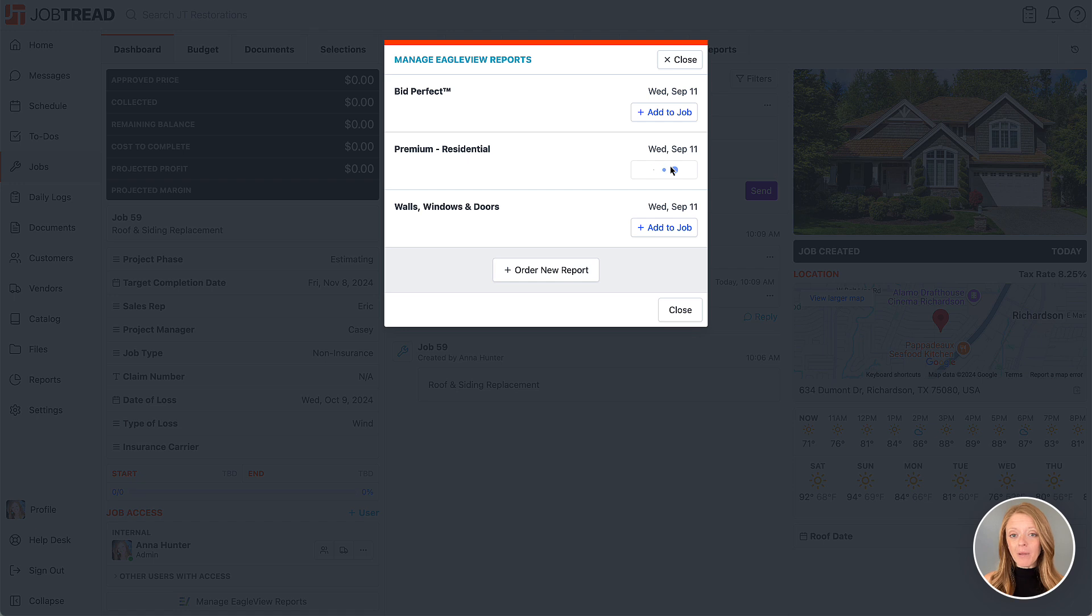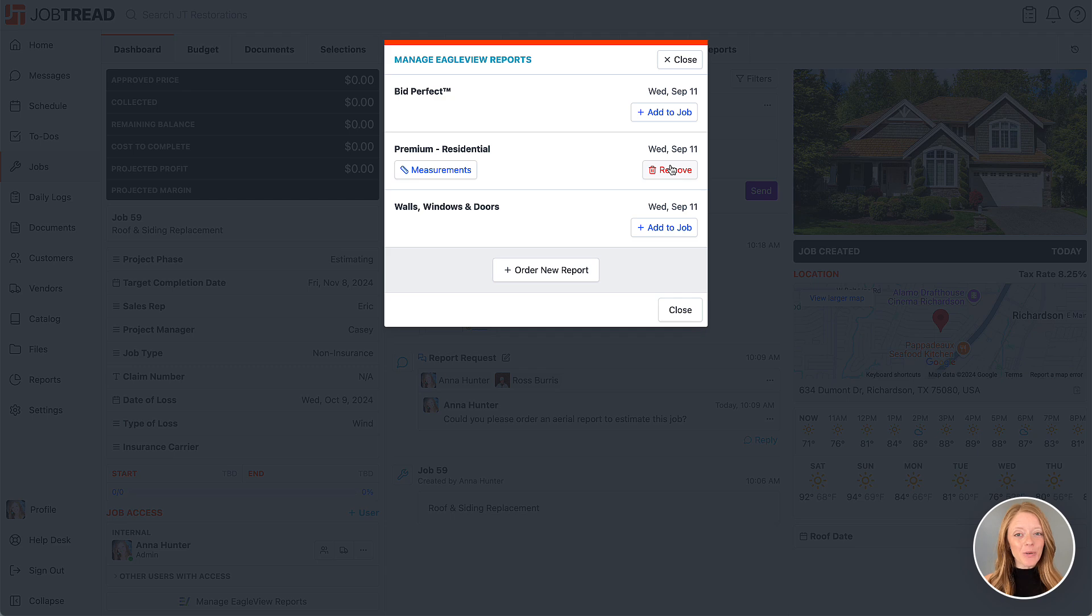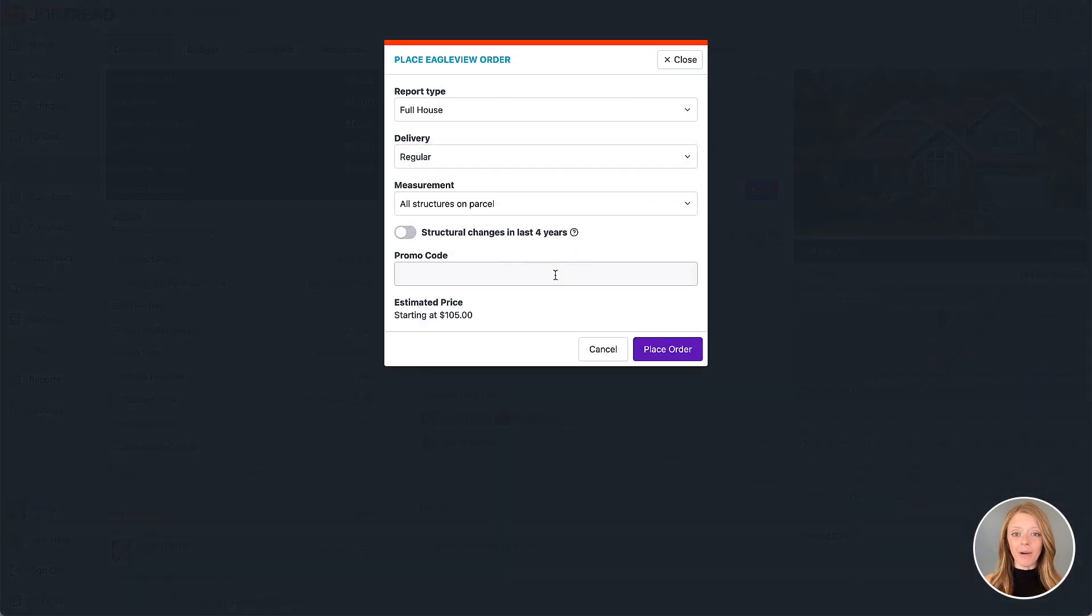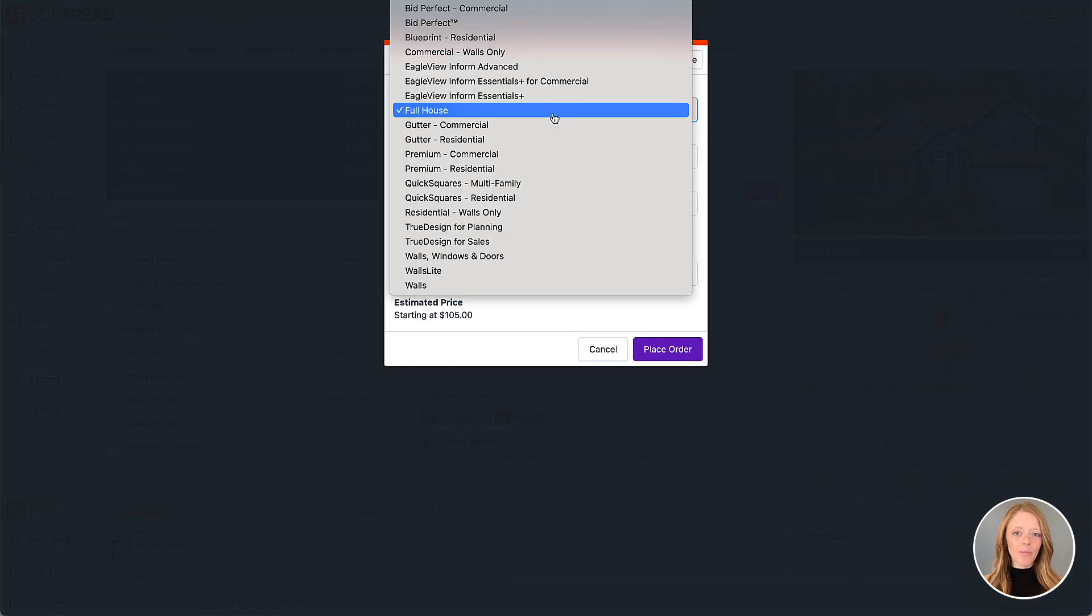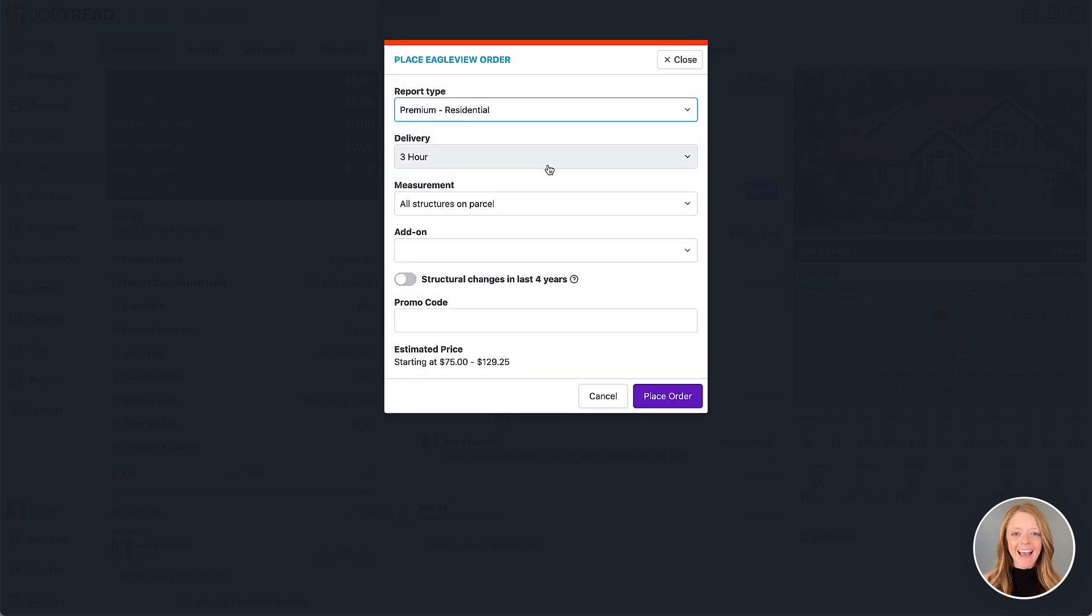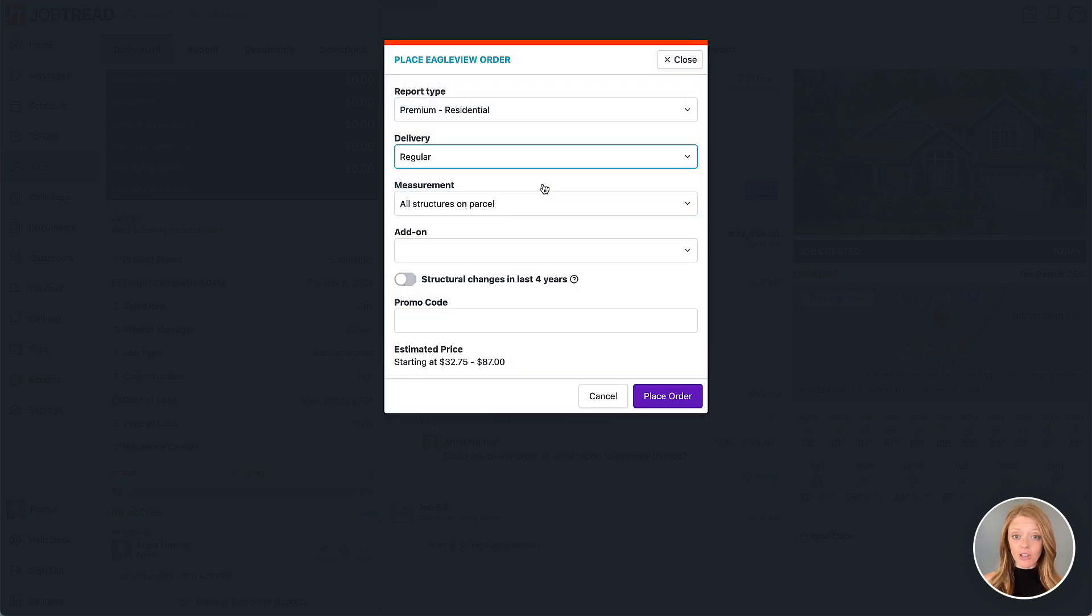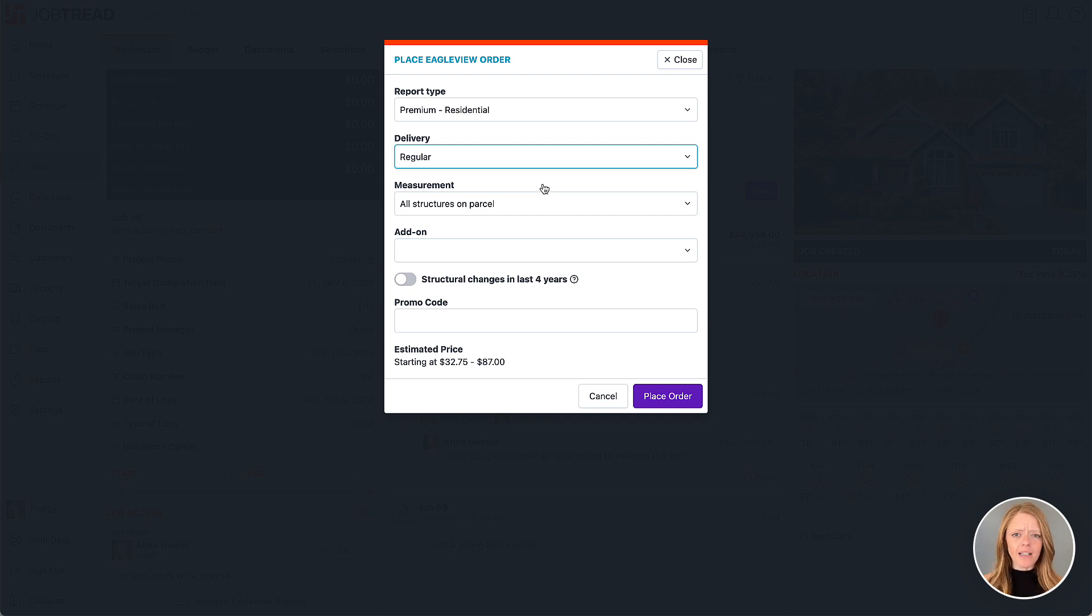The report will then be pulled in as a PDF and stored as a file on your JobTread job. If you'd like to order a new Eagle View report, simply click the order new report button at the bottom. Choose the report type that you need and then select the delivery speed. Reports that have standard delivery could arrive as soon as three to four hours after you place the order, just depending on the request volume.